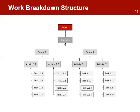The main activities identified throughout the log frame analysis are a summary of what the project must do in order to deliver project results. The WBS is a results-oriented hierarchy decomposition of the project work — a technique to break the activities into manageable tasks. The breakdown allows for tasks that have sufficient detail to estimate their time and the resources required. Each task can then be assigned to an individual responsible for the actual work. The WBS is usually represented in a graphical chart that identifies all the work required to deliver an output.